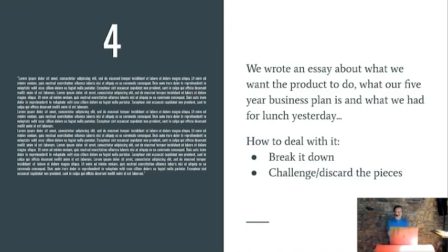You need to go through the long paragraphs of text. You need to try and pick out what's actually important, what actually describes what a user needs to do, break it down into separate requirements, challenge anything that seems irrelevant and discard it, or separate it out, and the ones that are real requirements need to be addressed at an individual level.